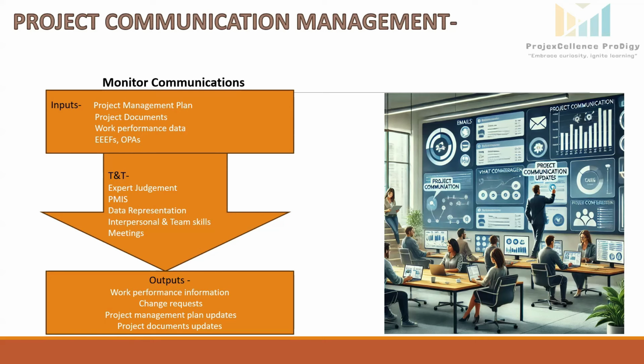Project management plan updates. So updates to the communication management plan for better messaging. Updates to the stakeholder engagement plan to reflect new needs. For example, after investors request monthly instead of quarterly reports, the plan is updated to meet their expectations.